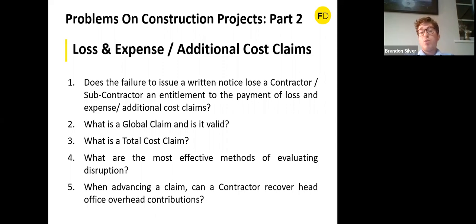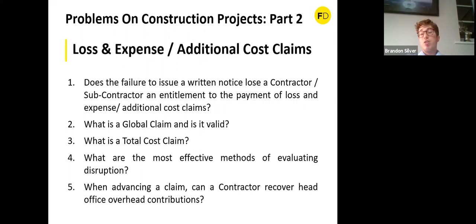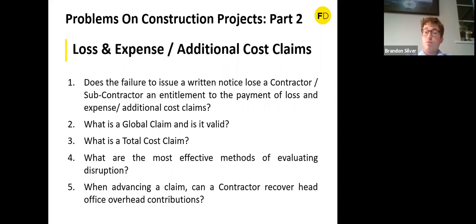A total cost claim is a version of a global claim. For example, a contractor says: we spent one million pounds on this project, you have paid three hundred thousand, so we want seven hundred thousand. That is a total cost claim. What it ignores is: (1) underpricing in the tender — the contractor may have failed to account for certain things which explains the cost overrun; and (2) it does not strip out losses that are the contractor's own fault. Such a claim will fail.